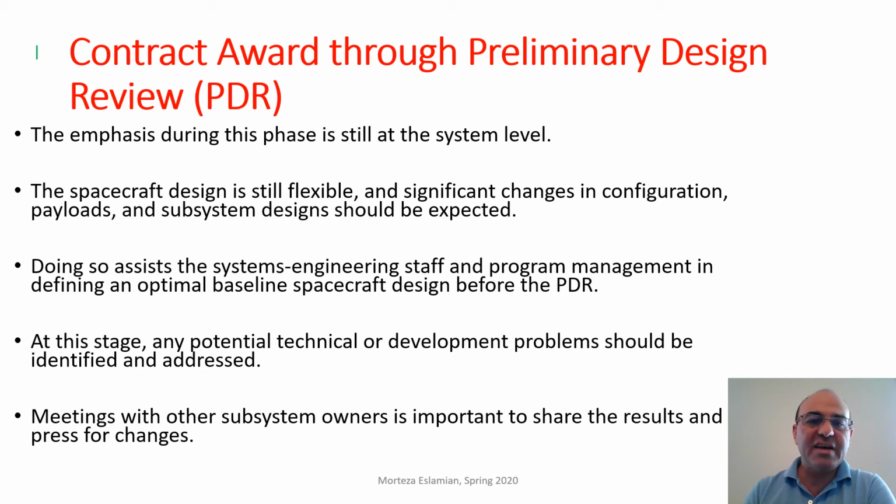So once the contract is awarded, then there is a period of time, let's say 1 year or half a year, 6 months or less or more, through the preliminary design review, PDR. So design review is where the representatives of the contractor and customer sit together and review the preliminary design.